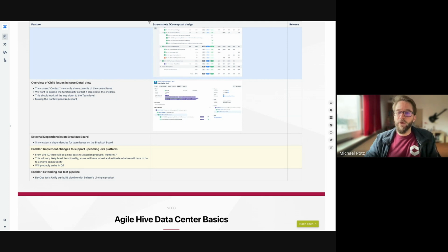These might be quite helpful when you're doing your PI planning and you have dependencies to teams or to projects that are not in the art, and you can now visualize them here rather than having to open the dependency menu for each issue individually and look through the issues that are dependent on that. So giving you a quicker overview of which dependencies actually contribute to an issue.